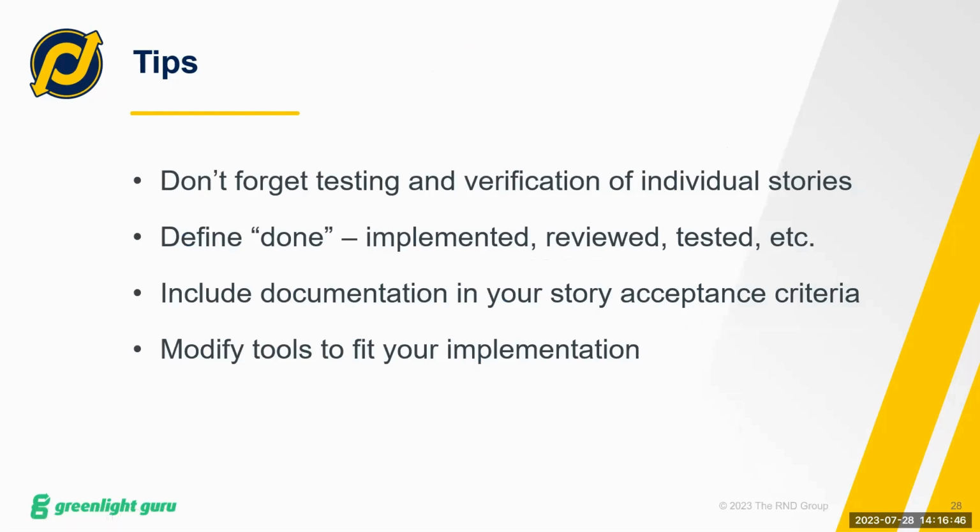Some other tips when you're implementing Agile practices or some of the concepts: make sure you don't forget testing and verification of individual stories. Now, you did see it on the last slide, but I've worked in other organizations, not the R&D Group, where they have their backlog items and they call them done when they're implemented. You have to be really careful, because you're not really done until it's been tested and verified.